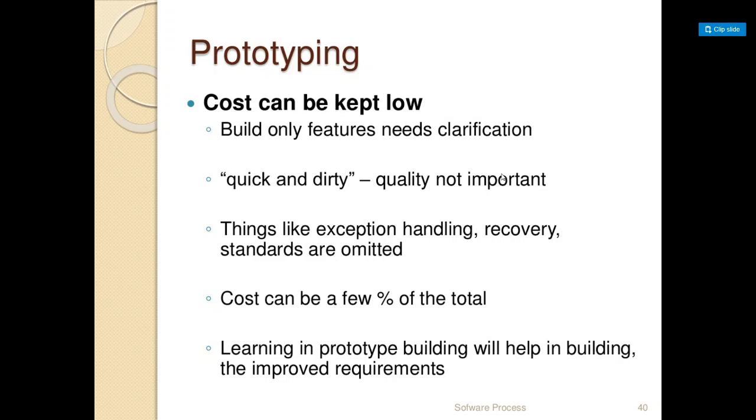Next is prototyping. What is done in this prototyping actually? The cost can be kept low. As I told you, the thing here is to finish it fast. So build only the features that need clarification. Then it's quick, so it may not be that complete or perfect. Exception handling and recovery standards are omitted. That is, only what is needed is done.